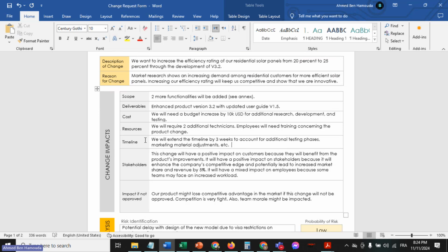Okay, so you don't say just that these might have an impact on the schedule. You don't say that. You have to be precise. Okay, how much impact will that be? All right, because then the CCB will need to decide on precise data, exact data.